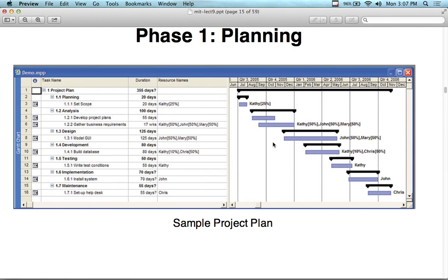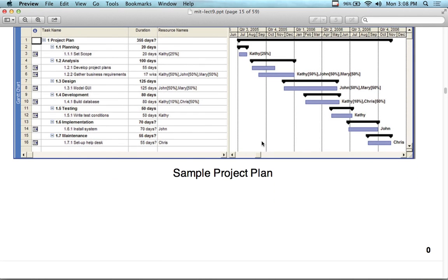So at any one moment of time, if there was a delay, let's say here, you can use the software, and this is interesting because there's a lot of people that don't understand how to use Project. They put it in once, and then they give it to the manager or their boss, and then they go away and just leave it. The thing is, the management software is for the entire life of the project. So up here, when the guy shows up 10 days late, or the piece from China doesn't show up on time, you make a little schedule adjustment and it adjusts everything else. So at any one moment of time, you can tell exactly when the project's going to complete. It's not static, it's dynamic. It grows and changes as the project changes.